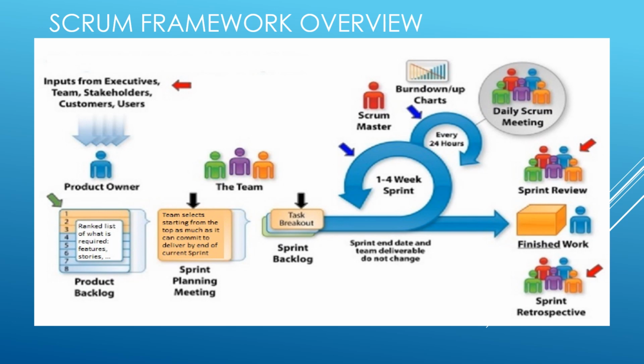Sprints are a time-boxed event. A sprint is generally 1 to 4 weeks in duration. First, in a sprint, the sprint planning meeting is conducted. The sprint planning meeting will be organized with the Scrum team along with the required stakeholders. Sprint planning is time boxed to a maximum of 8 hours for a 1-month sprint, and for a shorter sprint it is usually shorter.